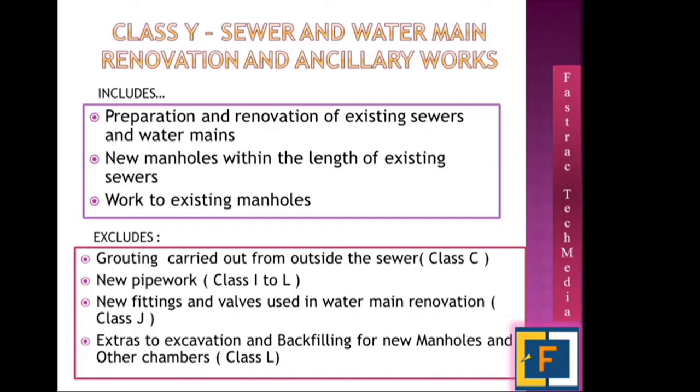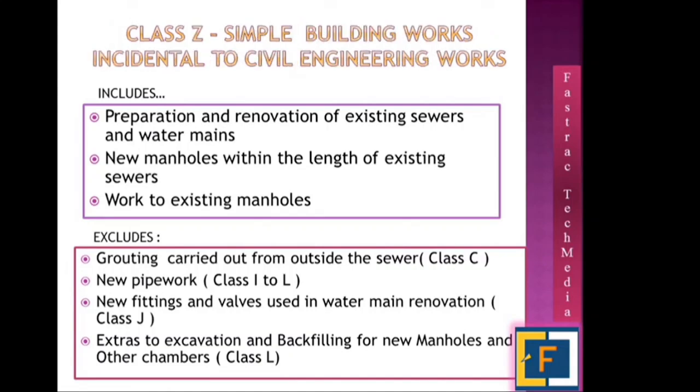So this is also a confusing area. New pipe work, class I to L, new fittings. So what is included in class Y? That means it requires some renovation work, other than normal new work. That is the thing. So when we quote, if you are an estimation engineer or you are preparing a tender calculation, you have to consider those things.